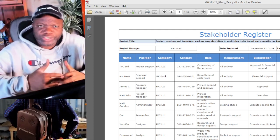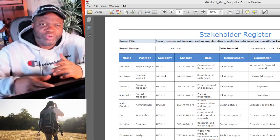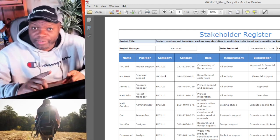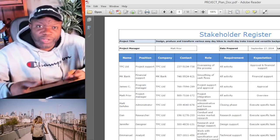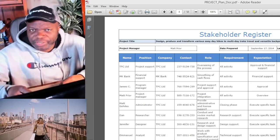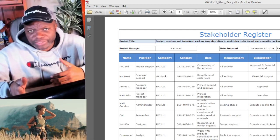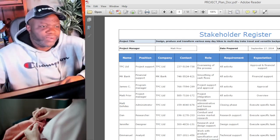You don't really finish planning before you go into executing, because there's rolling wave planning. So even though you do some planning and you come out with a project management plan, you got to remember it's version 1. Even though you've come out with a project charter, you need people to help you plan the project. So in some instances, you need to get into executing, which is where you do the recruiting, which is where you bring people on board. Remember, we talk about acquire resources. It's in executing.